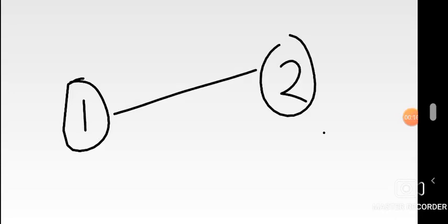I've noticed in the PERT video and the CPM videos that when we're drawing those nodes, like node 1 going to node 2, we have not been including arrows. Well, it's a requirement in this networking process that when you're drawing a network from one node to another, arrows should be included. We just did not include them. It was just for quick calculations and the like, but please, arrows have to be included to show the direction of where an event is going and from that point to another. Just take note of this whenever you're drawing any networking model.